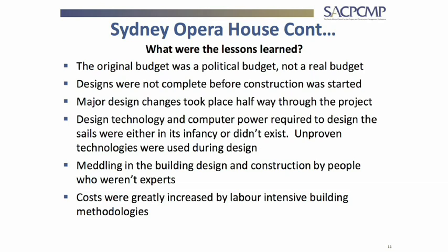Then they had the meddling in the building design, and the construction people weren't experts. So you had a government wanting to build it, no construction background, didn't really make use of an owner's team or an EPCM team. And then, of course, in the building design, after 7 to 8 years, they fired the original architect and brought 4 new architects in, which caused total disruption, validation from scratch. They had their own ideas, trying to implement their own way. And that also just derailed the whole project even further.